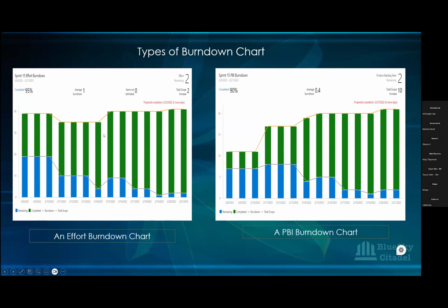Now, one of the things you can use your chart to look at is the start of the sprint. You can see 3 days where nothing was burning down. And then on the 4th day, they burned down something. And then for 4 days, nothing again. And then the total scope increase of 2 that we see came in here. And then you can see again nothing